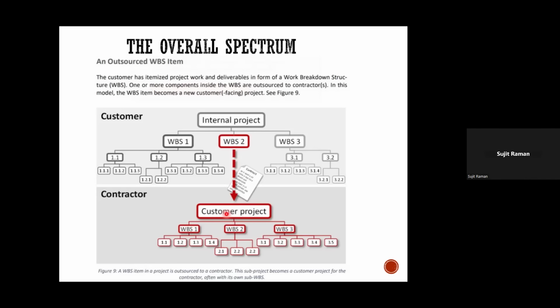Right? He will break the statement of work into activities and create the project schedule in the form of a Gantt chart, or if they're doing it in Agile, then it should be an Agile release plan or whatever. So that's why I am emphasizing a lot on the customer. See, a project has a customer-supplier relationship. There's a customer angle, there is a supplier angle, right? So you have to understand when you have to create a charter, when you don't have to create a charter.